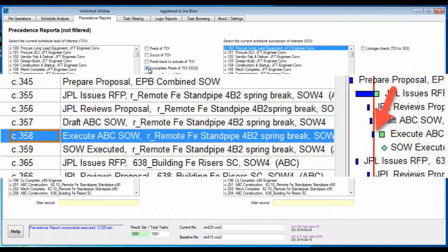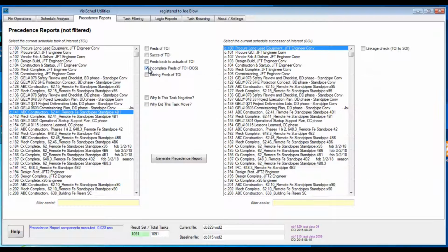You won't need this if you unfailingly correct all out-of-sequence relationships as you go, or if you schedule in progress override mode. But in a very large schedule, when time is short, it's nice to know exactly where the problem lies in a few seconds.